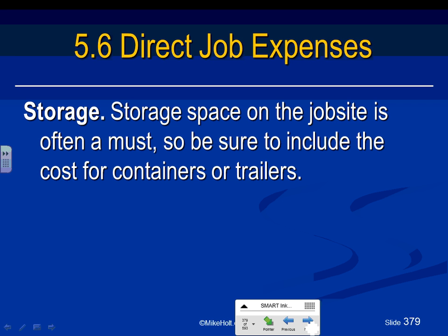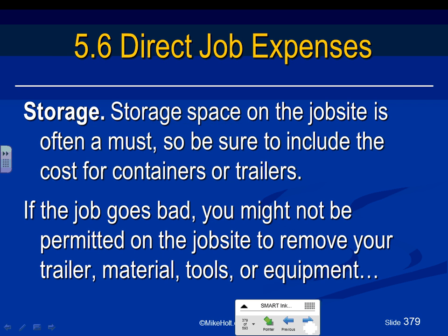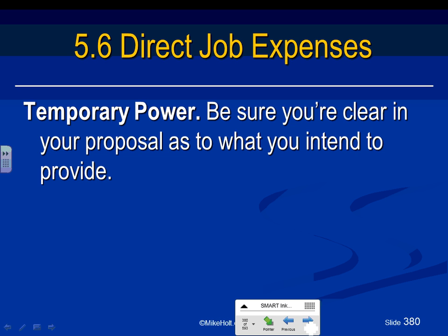Storage should include the cost for containers and trailers on the storage if you have to store material on site. And this says if the project goes south, guys, meaning bad, you might not be able to get your stuff because it will be held by the owner.